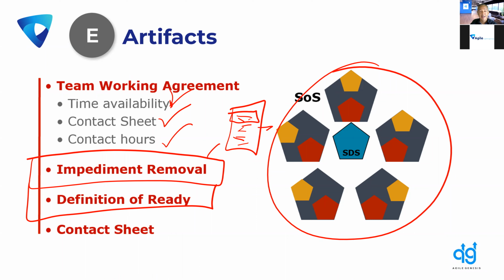And that's going to take time. And one of those includes agreeing to what ready means. Does it include acceptance criteria? Has it been prioritized? Has it been estimated? These are all elements that are important in order to ensure that the team is able to take on the next set of product backlog items or user stories, as sometimes we tend to call them, right?